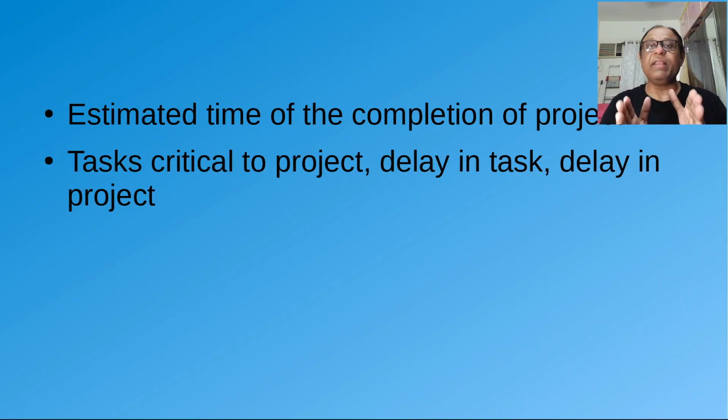Critical in the sense that if we delay in performing them, or take more time, we may have planned to perform our activity within a certain amount of time, but then if we delay, the entire program is extended. But there are also certain activities where delaying them is okay. It really does not affect the overall completion time of the program or the project.